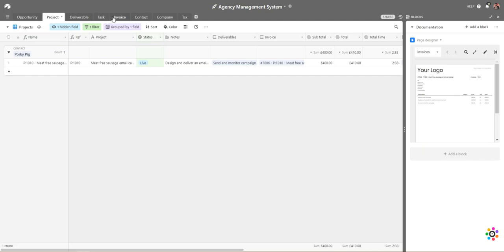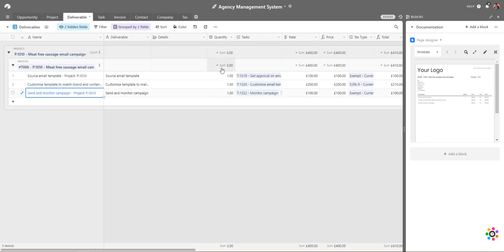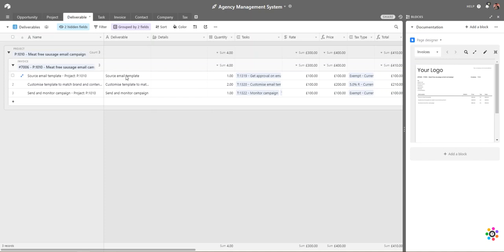If we want to build up a price or an estimate for our client, we go into deliverables. We've created a range of deliverables against this project — sourcing an email template, customizing it to match the brand, and sending it. We attribute a quantity and a rate to each: for example, a quantity of one at a rate of 100. If I change the quantity to two, the price automatically updates. You can set whatever rates apply to each type of work.